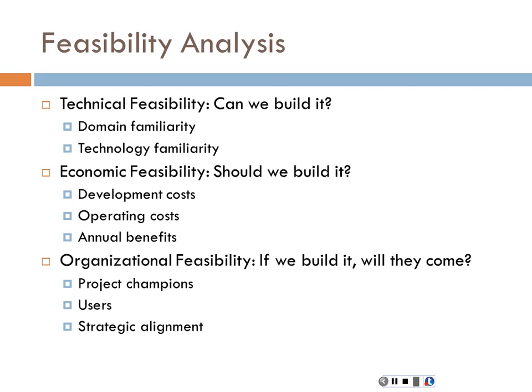So typically the reason you do this is so you can begin to identify ways of actually overcoming some of those potential deficiencies. For example, if you don't have a familiarity with the marketing area, it may make sense to have somebody from the marketing area on the team who has the domain knowledge to actually understand the various types of data that are processed, the roles and responsibilities and things like that, right? So that will feed into the requirements documentation as well.